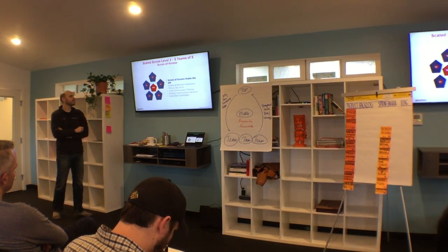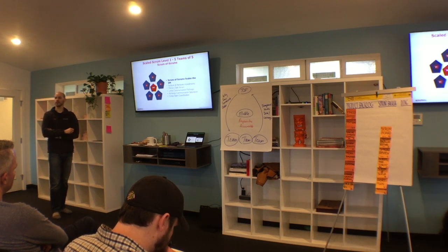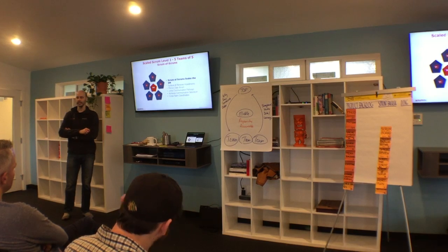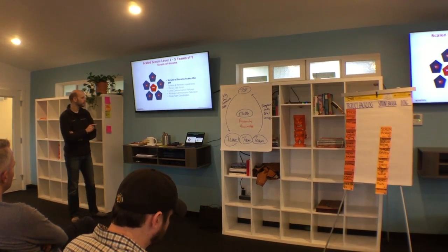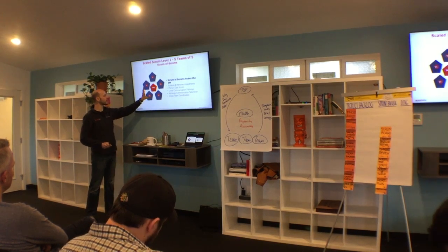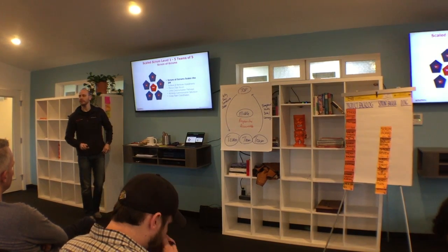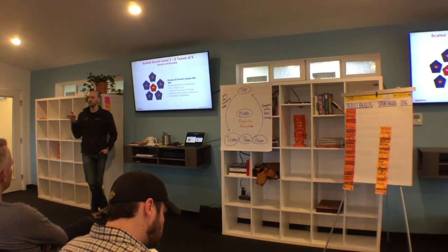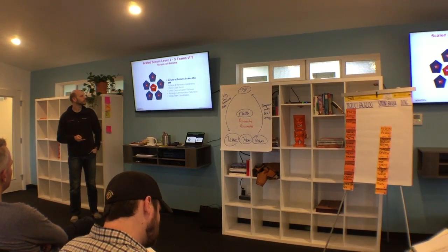Here are 5 teams, the scrum of scrums. What you just did, we did it across 6 teams. That's already getting a little big, and I'll show you why in the next slide. Although I bet many of you know already. But for 5 teams, the scrum of scrums meet for 15 minutes after their 15-minute daily stand-up, and they just repeat the daily stand-up.